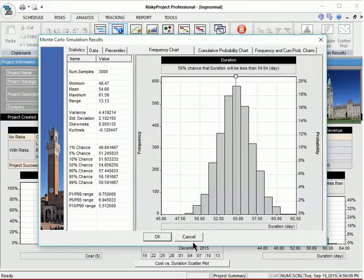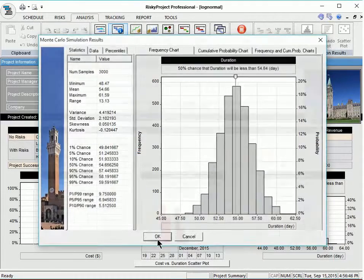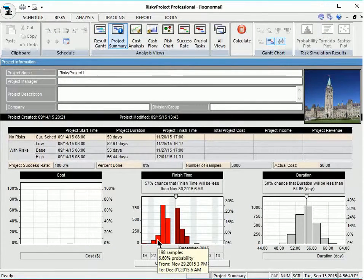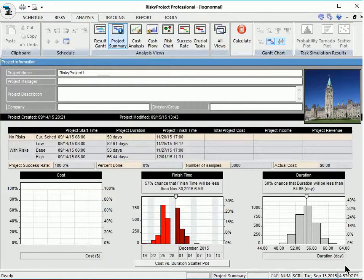So really, there is a little bit of difference on the edges but not a lot. When modeling a project, the effort to go in and assign a distribution other than triangular is probably not going to give you very much of a difference in your outputs and analysis of the schedule. In almost all cases, the type of statistical distribution you pick will not make a significant difference in your results. As triangular is the quickest to model, we recommend that it be your default selection, except in those cases where either historical data or expert opinion indicates otherwise.